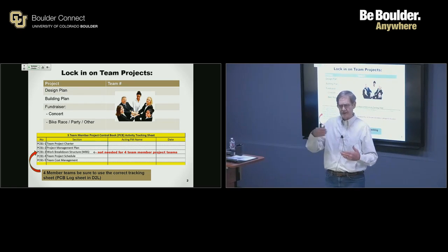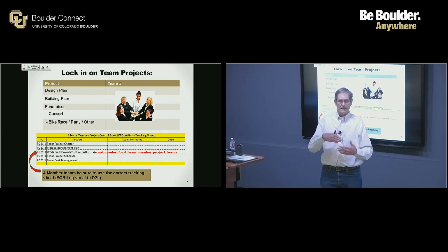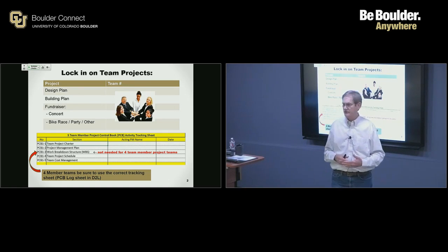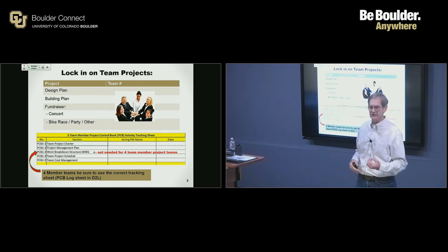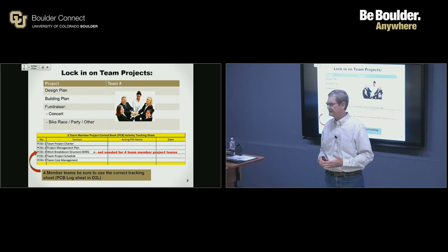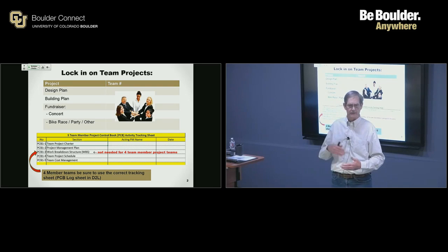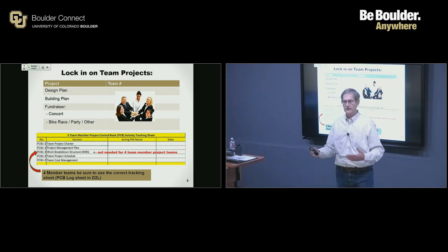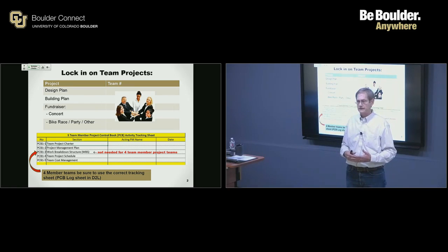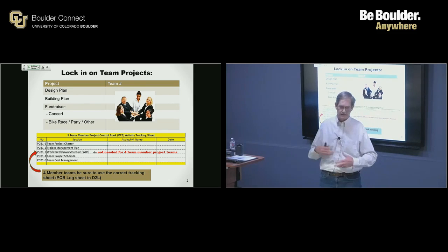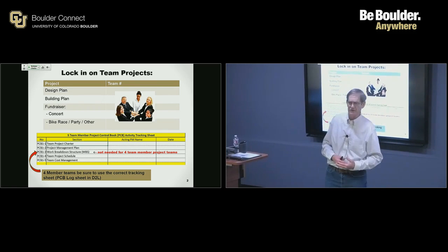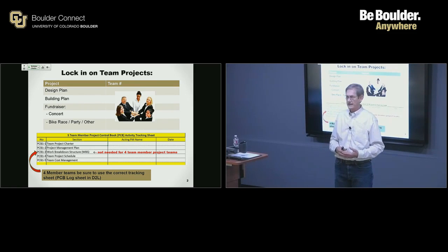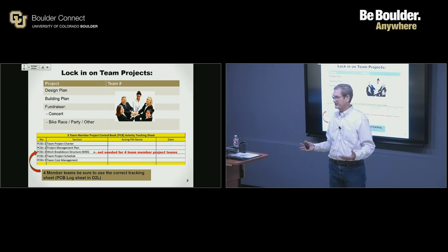As mentioned, iterative process, and there's another term or phrase, you've probably already seen it. If you haven't, you will soon, called progressive elaboration. Does that ring a bell? Yeah, it's that one step forward, learning more about the project, and then adjusting accordingly, maybe updating documentation, that sort of thing. So progressive elaboration, it's learning more about the project. When do we know the most about the project? Beginning, middle, or end? At the end, right? Absolutely, when the project's done.